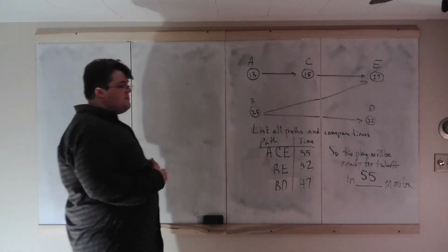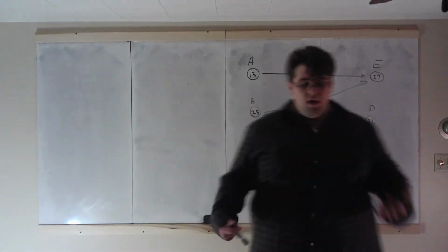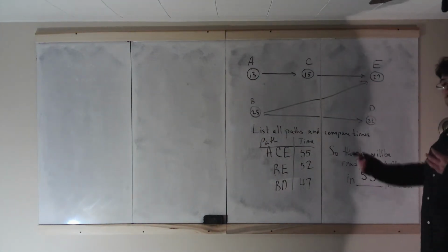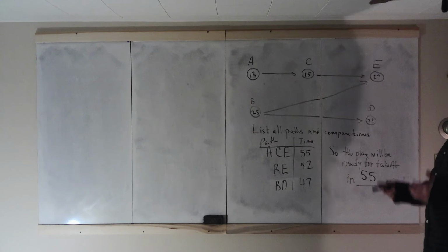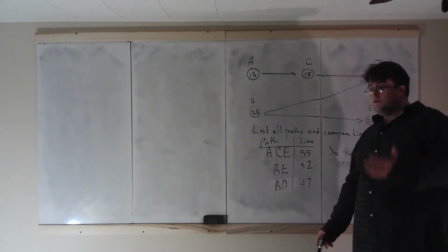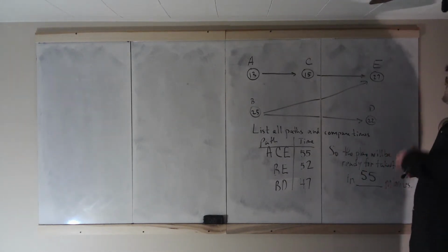In 55 minutes, it will be ready. Now, many of you probably thought 47 minutes because it is the smallest time. But notice that we are not concerned with which tasks can be completed the soonest. We're looking for the tasks that are going to be holding us up in trying to complete this job.